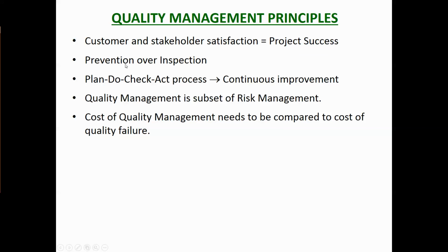So what you want to do is prevent non-compliance happening. That includes training, making sure that the people doing work in your organization are trained and qualified to do the work, so that they're not going to make mistakes. They know what they're doing. Rather than looking at their work and saying, oh, that wasn't done right, rip it out, do it again, because that is really expensive. You've picked up the non-compliance, but now you're going to lose time and money in fixing the mistake. It's better that the mistake never happened in the first place.